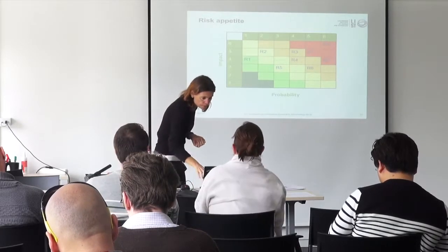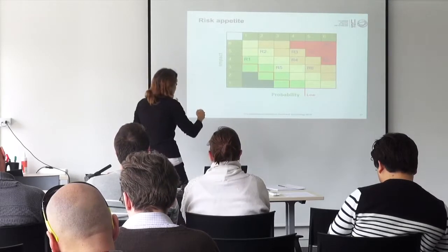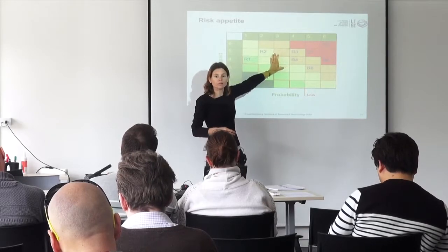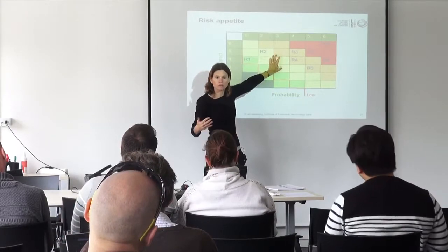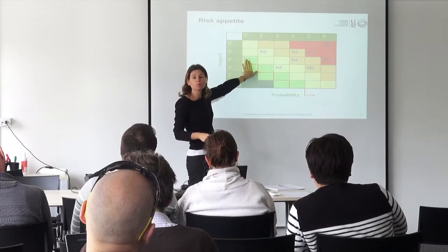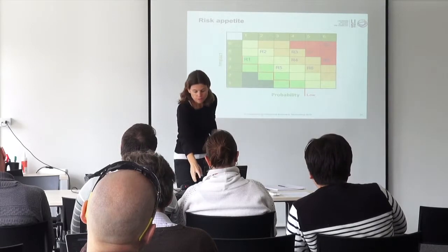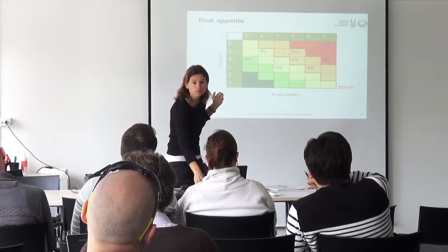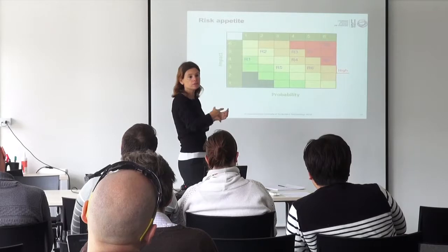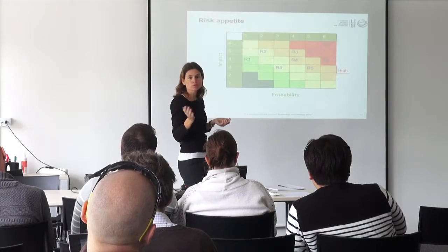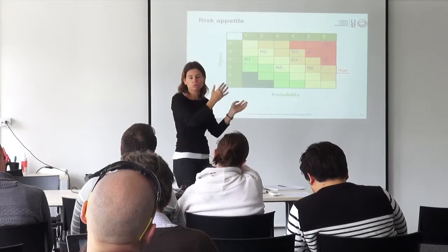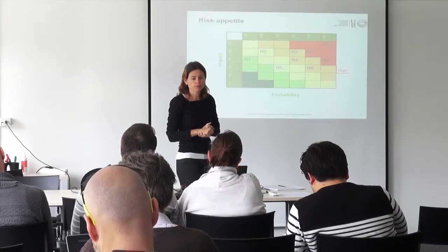low. That means the line where you say, all the risk above that line I don't want to take without any mitigation action, that line in the banking industry would be quite low. Whereas in some other industries, it's in the middle, and in some other industries, it's quite high. If I don't take the risks, I know that in 2 years I'm not there anymore because I have not invested or innovated enough, and I'm gone because all my clients would go to that other company.